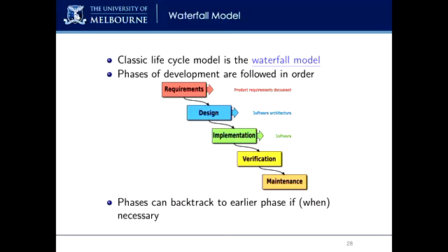You've probably all seen this kind of thing, the project lifecycle, the waterfall model, where each section is done in turn. But the issue with this, and what you often have to deal with, is that changes do happen mid-flow. And the further down the chain that the changes happen, the more costly it becomes for the developer. Sometimes you'll have a certain structure that you've designed specifically for that project. And as the project changes after the design, maybe even at the verification stage, it takes a lot of work and effort, and lots of money is wasted going back to the design stage. So you almost have to flow water back up. But in a perfect world, the waterfall model should theoretically work. I've seen countless job advertisements saying that you need to have this waterfall cycle understanding and be cognitive of it. But in truth, it's pretty old-fashioned and seldom works very well, especially when you haven't got fixed and firm project scopes to deal with.